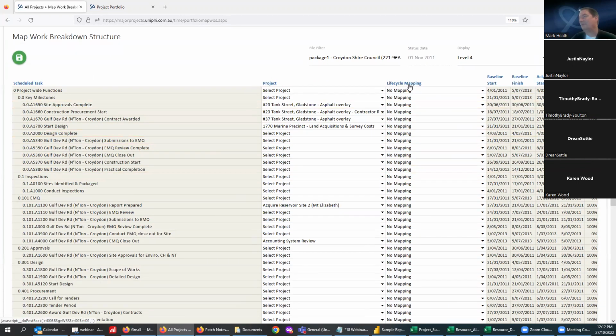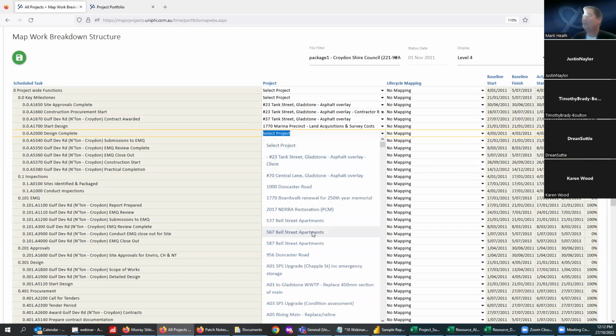And then what you're able to do is map to either a project or a life cycle for the dates to update. But what's additionally included in this is the earned value % complete as well. So people can come in and map. Some of our standalone deployments, like for Sydney Metro, Melbourne Metro, Inland Rail, Warringah Freeway, et cetera, will have our setup as tasks rather than projects potentially. And so these will be activities, and they will be mapping their P6 schedule to the activities.